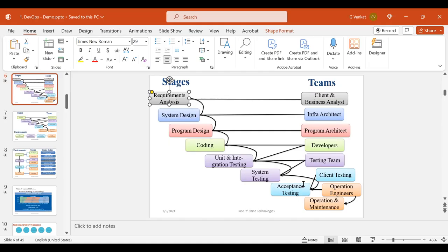Then where has this gap come from? Has it come from the requirements itself, or is it at the design level, or the implementation level? They need to go for reviewing all the stages. If the gap is in the requirements, then again they need to change the requirements document, and as per that the design, the implementation, then evaluation, and finally bring it here. So have resources been impacted or not?